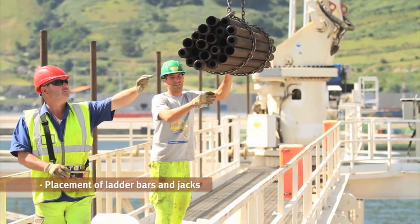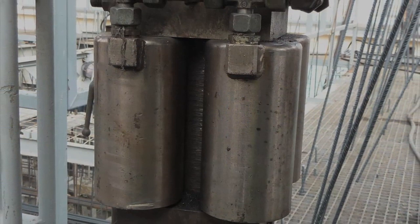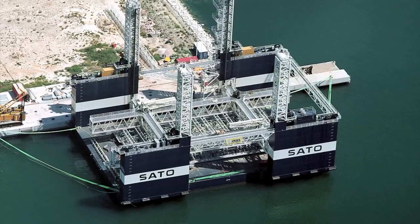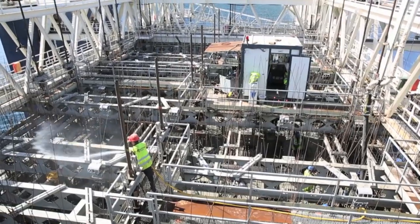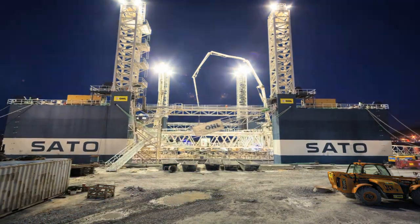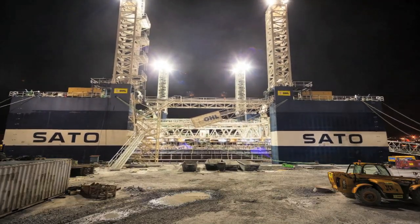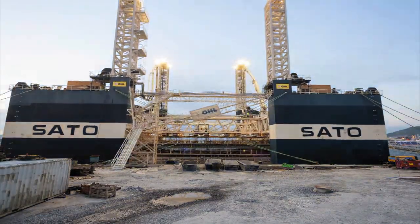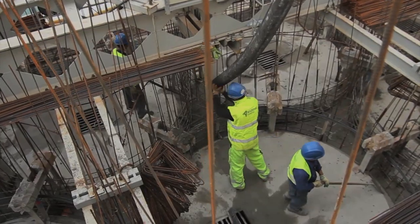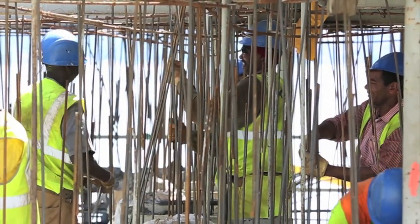Rods are supported on the slab, which will act as support for sliding the formwork using hydraulic jacks, which are activated by a control system simultaneously with the jacks in the towers to guarantee the leveling of the umbrella and the verticality of the shaft. To avoid the formation of cold joints, the shaft is cast round the clock in shifts with the various tasks of reinforcement of caisson walls, pouring concrete in different batches to guarantee uniform distribution, vibrating concrete, and cleaning of working platform and formwork panels, all being carried out simultaneously.